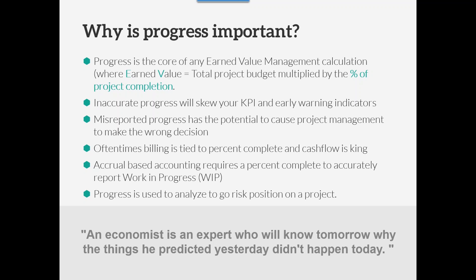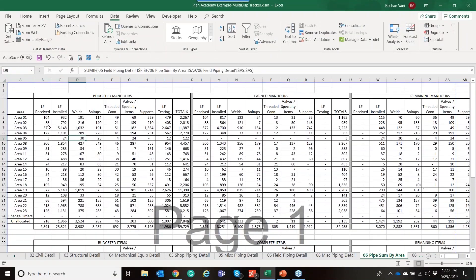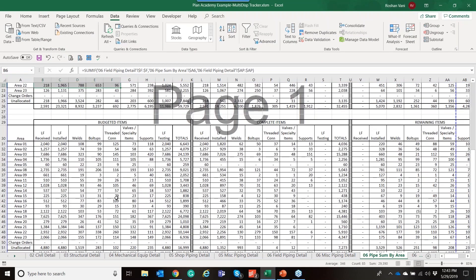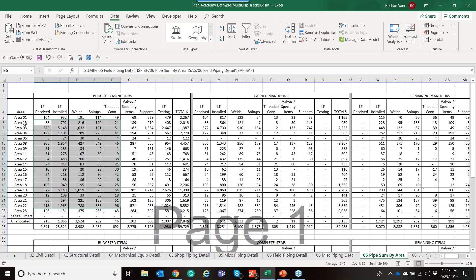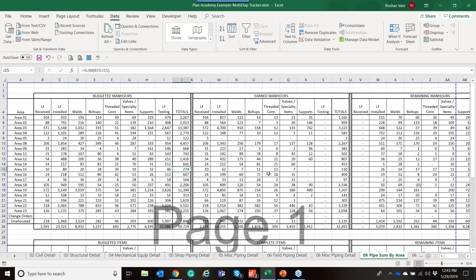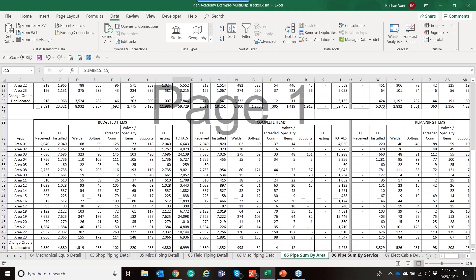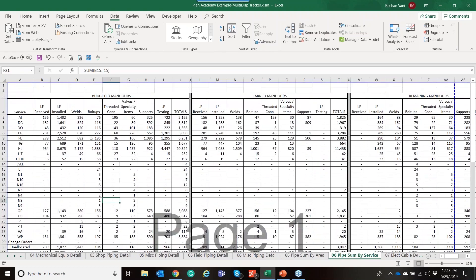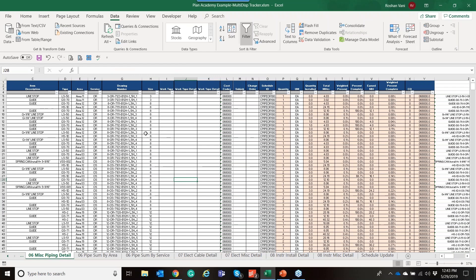And so it all comes back to that percent complete calculation and validating where you are. Because giant spreadsheets like this, where there's an area designation, large sum-if statements for these different rules of credit, to be able to do summaries by area or summaries by service. Lots and lots of information to be understanding where we are, where are we at, are we ready for hydro, what do we have left in punch list.